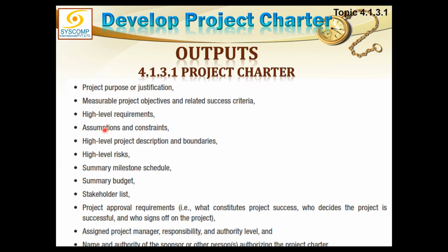The charter is not a very descriptive document. It normally is just 1 or 2 pages long, but very briefly you provide a high level project description and its boundaries, what the limits of the project are, in very few words, few lines, nothing more than that. You don't go writing a thesis. If you have any opinion of big high level risks, although we will define the detailed risks later in the project, high level risks must be identified, known and written down in the charter if possible.